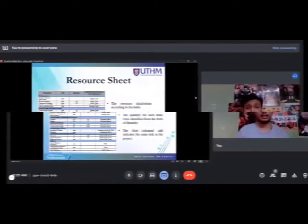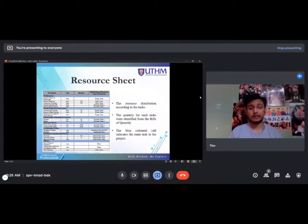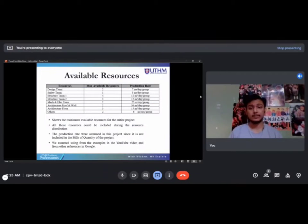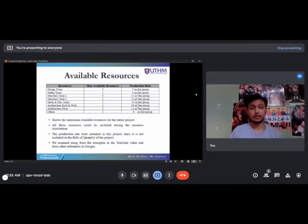This table shows the resource distribution according to the task. The quantity for each task will be identified from the bills of quantity. This table also shows the maximum available resources for the entire project. The production rate was assumed in this project since it is not included in the bills of quantity; we used examples from YouTube videos and other references from Google.